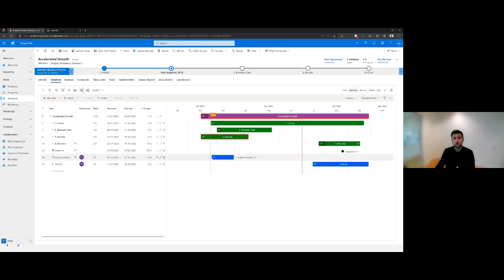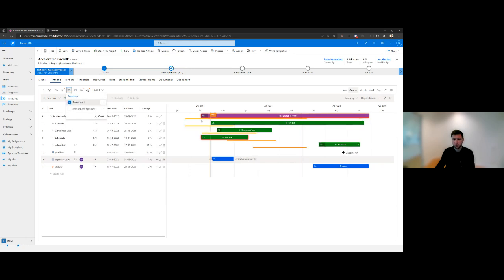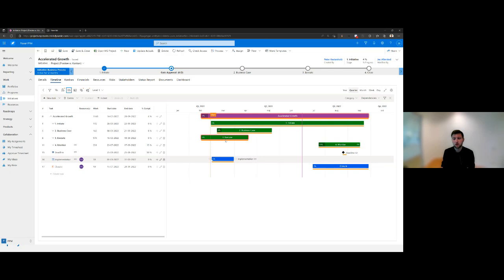that have an orange dot up here, that's the preview features. And you can now see that, for instance, baselines, I can show here, okay, I have a baseline on in an earlier stage, and how has my plan moved during the time. I can also decide to override that baseline, and I will then see that my tasks update. This is now in production, which means you can go out and use it on your production environments as well.